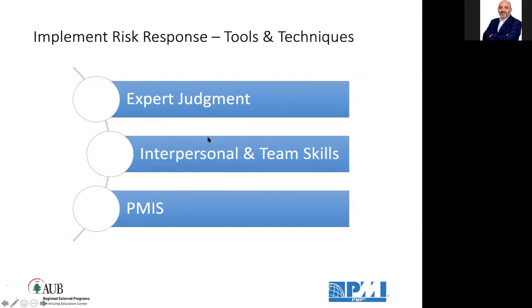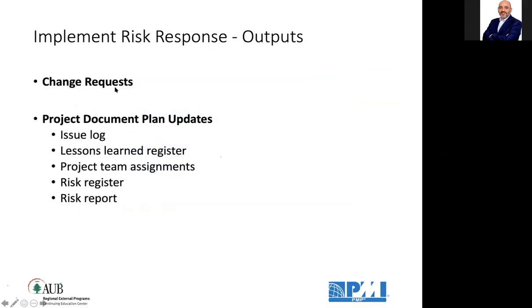Tools and techniques. It outputs change requests and updates on issue logs because you might have an issue that materialized. Lessons learned. Team assignments, because you are responding to risks and you have activities to follow. You might be changing the team assignments. The risk register is updated and the risk report is updated, if you did a risk assessment later on.